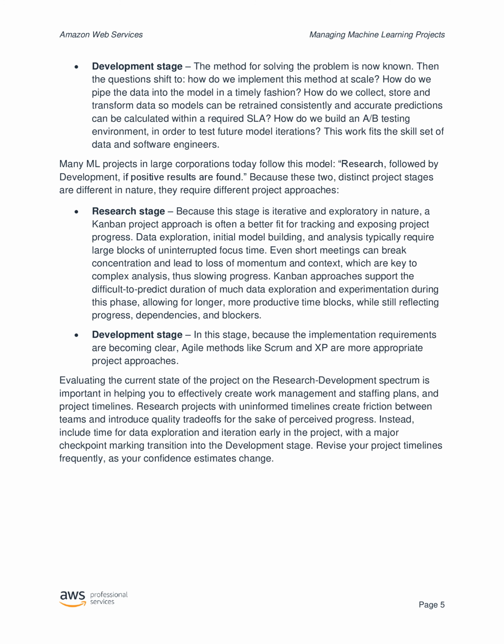Data exploration, initial model building, and analysis typically require large blocks of uninterrupted focus time. Even short meetings can break concentration and lead to loss of momentum and context, which are key to complex analysis, thus slowing progress. Kanban approaches support the difficult to predict duration of much data exploration and experimentation during this phase, allowing for longer, more productive time blocks, while still reflecting progress, dependencies, and blockers.